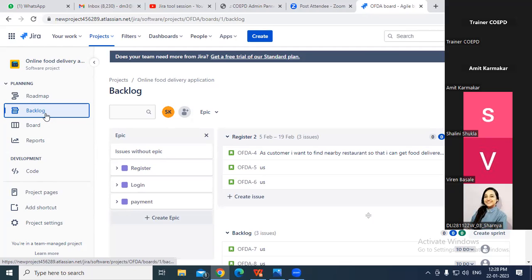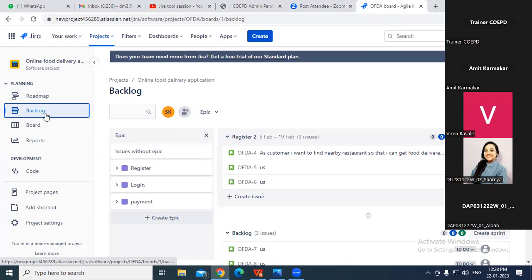Okay. Ma'am, you said that in the sprint review meeting, suppose out of 10, 8 user stories have been completed and the 2 have been left out. Once they're left out, that is discussed in that meeting. Yes. So is that documented or just word of mouth? It would be documented. How is it documented? Every meeting has an agenda. So there we have minutes of meeting, what was discussed, what happened, what questions to discuss. They will mention it there, and if required, they'll put it in Confluence or store it in their folder in the organization.